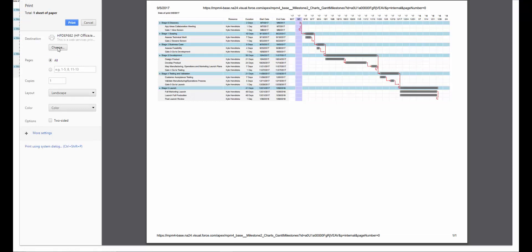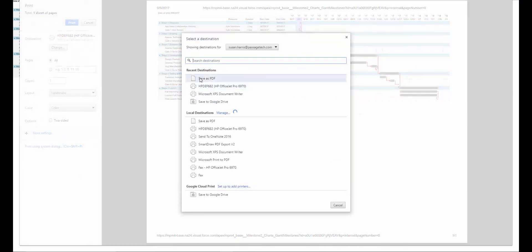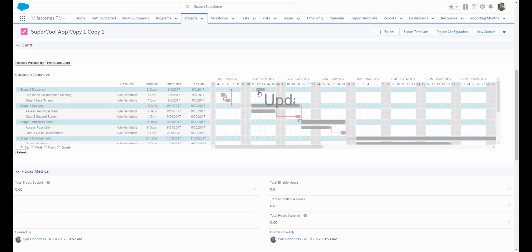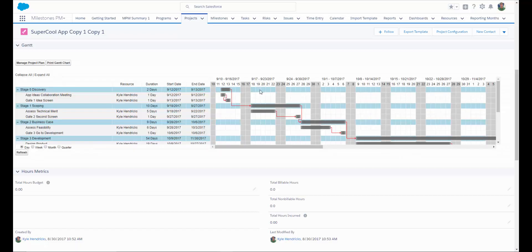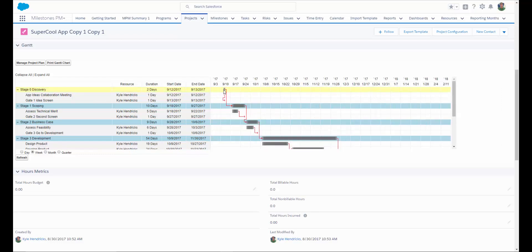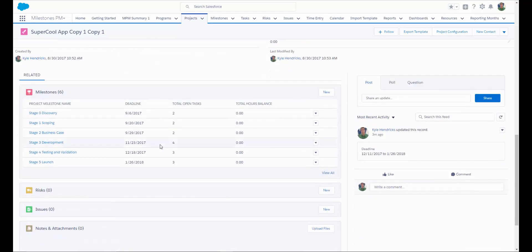The drag and drop functionality will allow you to shift your project by simply dragging your Milestones or your Tasks and dropping them in place. Once the page refreshes, you can see that the project has shifted for you. You can optionally view your project Gantt chart by day, week, month, or quarter. And you can also see any successor or predecessor dependencies that you've got in place.